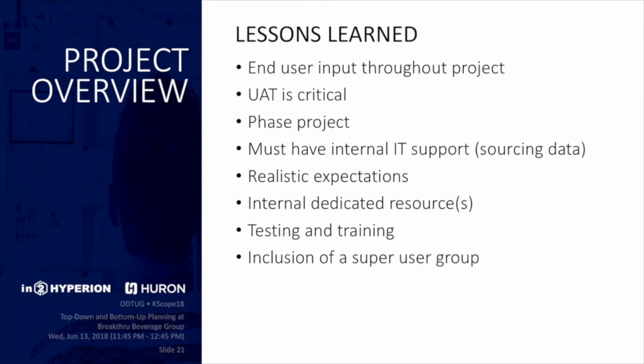Some of the lessons we took away from our project, just in case people haven't gotten here yet. End user input throughout the project. We did not start that early enough, and it was difficult to get people to buy in. So that was definitely something we came away with. A lot easier for user adoption. We eventually got there, but wish we had included people earlier. As a finance person, I didn't even know what UAT testing was until we got into this. But definitely keep that in mind.